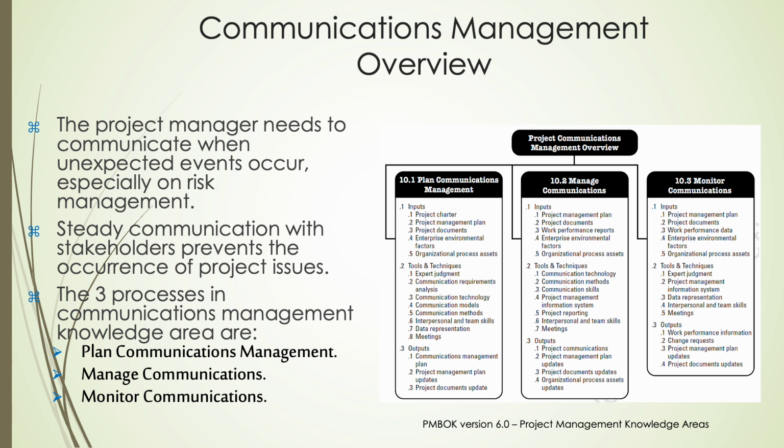Once communication planning is complete, the focus shifts to execution and oversight. Managed communications involves the active distribution of information using communication technologies, interpersonal skills, and management information systems. Meanwhile, monitor communications ensures that the communication process remains effective by analyzing performance data, incorporating feedback, and adjusting strategies as needed. Tools such as expert judgment, data representation, and meetings help teams verify that stakeholders are receiving the information they need. Together, these integrated processes help maintain transparency, resolve issues early, and drive overall project success.